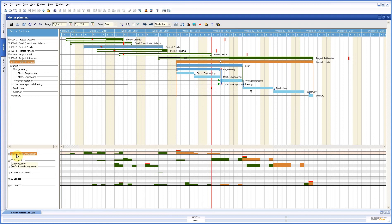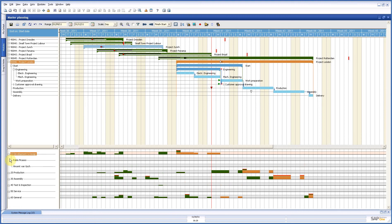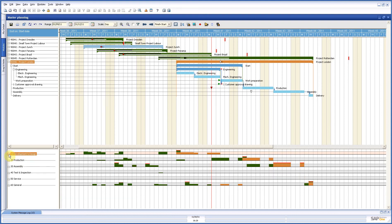Here down left you have your departments and in the department you see also the information about the capacity. In this case it says 64, this means 64 hours a week. Now how do we come to that? We have two employees in our department. Pablo is working 40 hours, Vincent 24, so all together 64 hours. And that is what you see here on the right side in this bar. It is 64 hours of capacity per week.